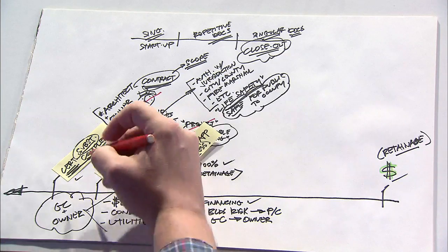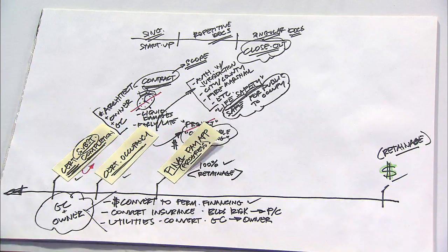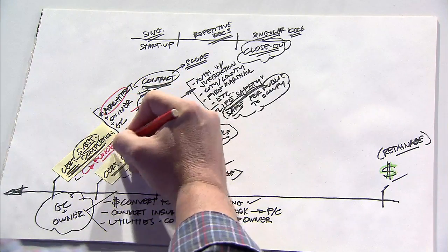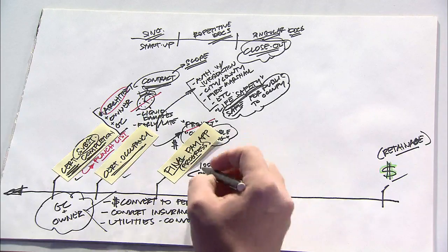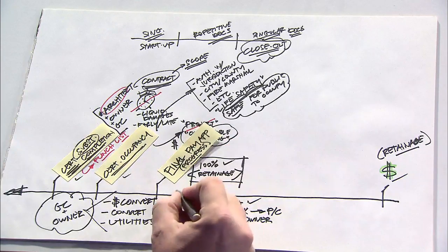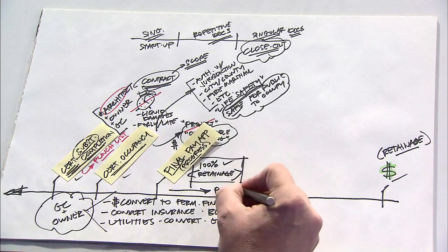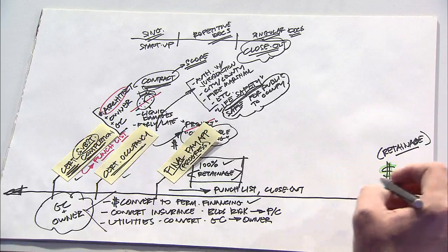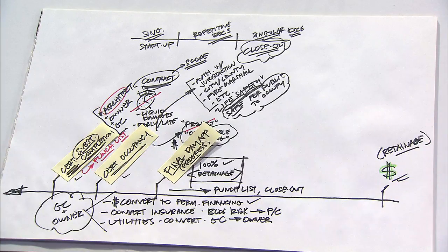One of the things that happens as a function of the Certificate of Substantial Completion being issued is the architect would also produce a punch list. And then from the time the contractor bills for 100% of progress minus retainage, then his task is basically to complete the punch list and provide closeout. All of which would be necessary to receive the final retainage payment.